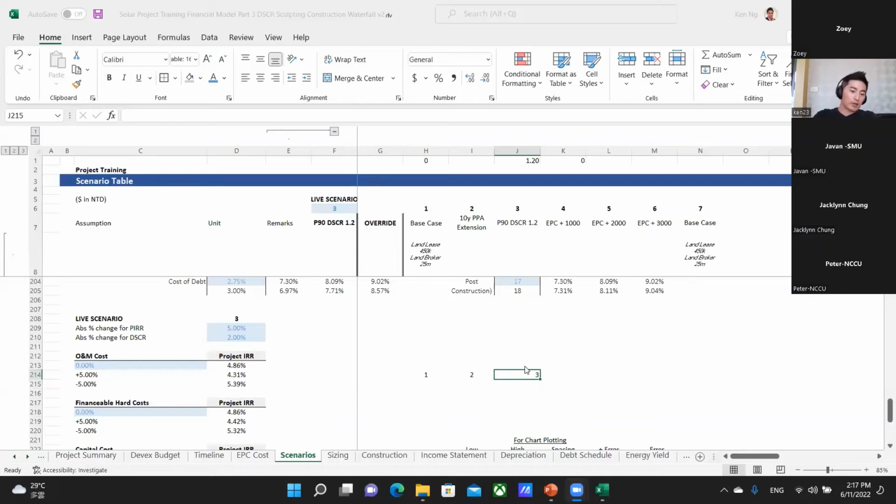When he achieves SI approval for me, I need to pay him 3 million bucks. And I also need to start acquiring the substation land. Until I've achieved the SI approval, I wouldn't incur these costs. So the amount of money that I'm risking to get to SI approval is 9.6 million bucks. That's the debt exit risk prior to SI approval.